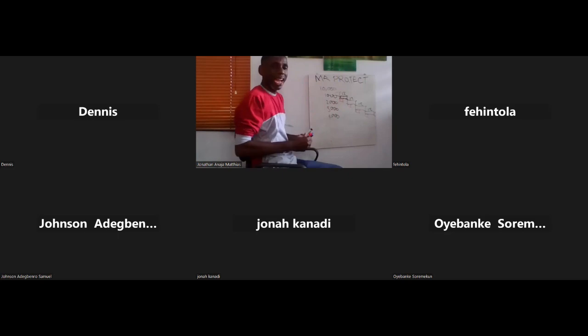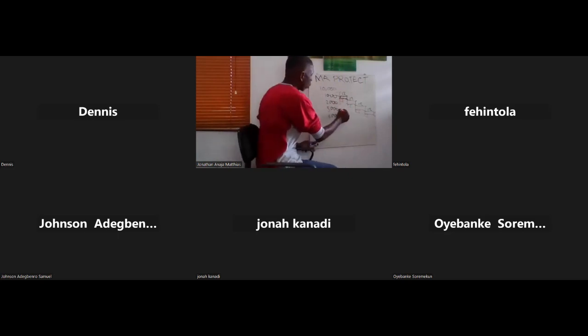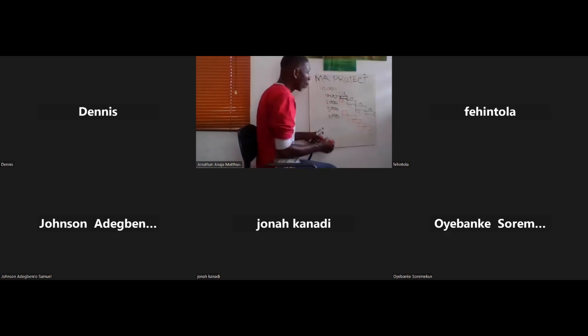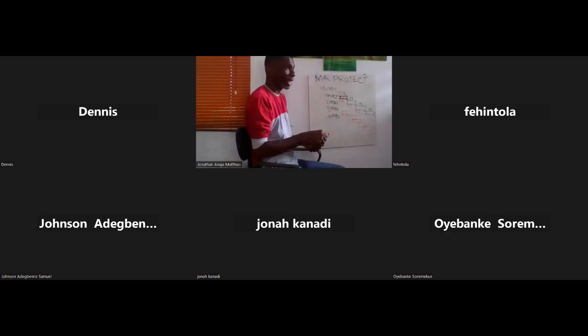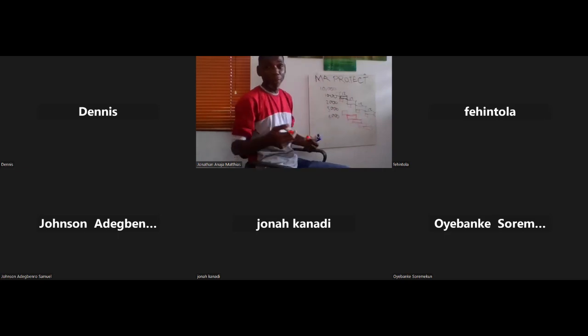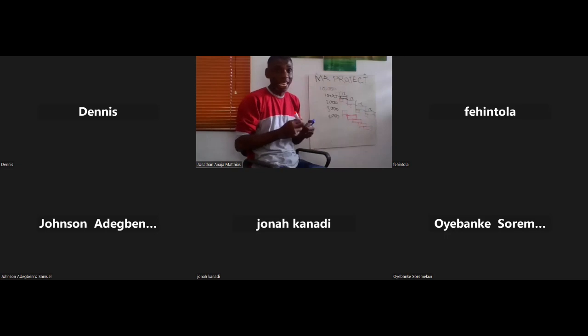So what did I have to do? I now say no. Since I already have 4 months gone before starting my year one, year two must overlap with year one by 4 months. Year three must overlap with year two. And I had to find a way to make sure, through consultation, that while this training is still on, we can onboard the next training. This is a project. And remember, I told us that a project is anything that has a start date and end date and has an objective to achieve, right?